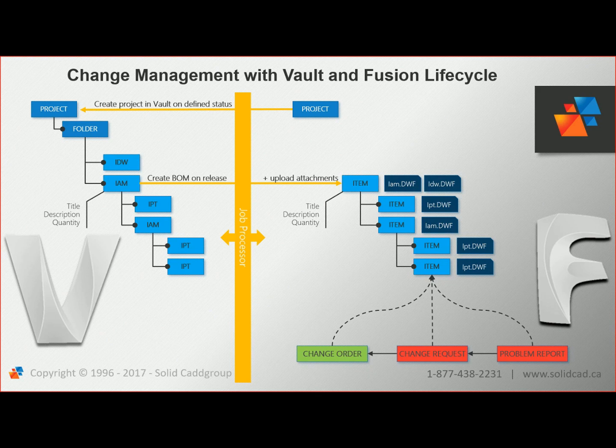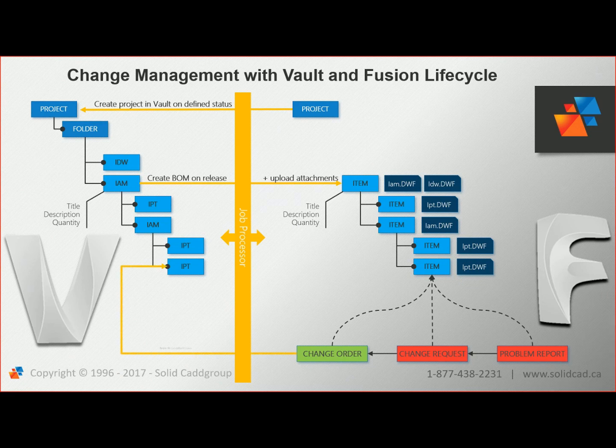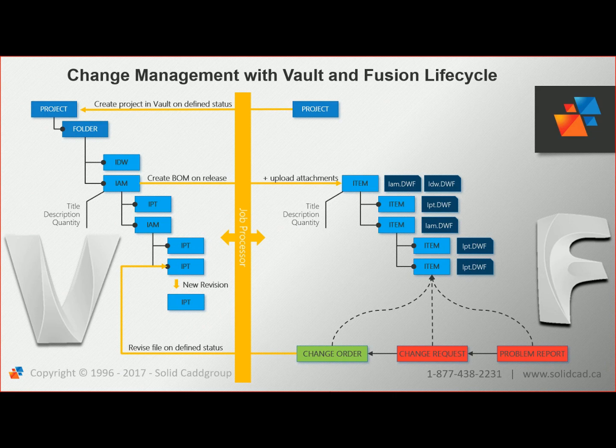When the ECO is approved, Fusion Lifecycle pushes the information back to Vault, where the impacted assembly is changed to a work-in-progress state. Designers can then make the necessary design changes and release the revised assembly.